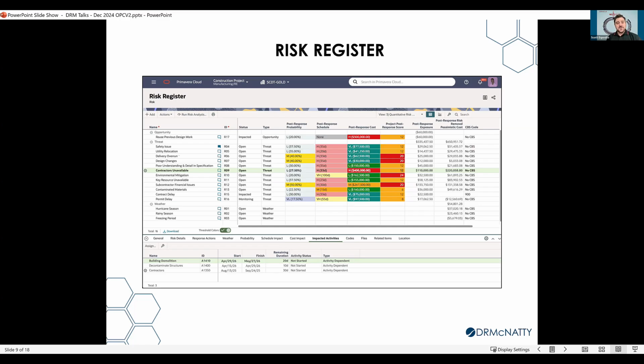So from a visuals perspective, running that Monte Carlo simulation, that probabilistic simulation modeling is what's really unique, right? So to have schedule and risk all in one place versus taking your P6 project out and putting it into another application to run that probabilistic model to get that output, it's all in one central location right now.